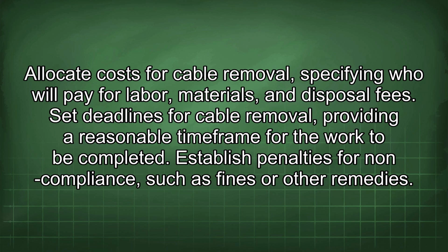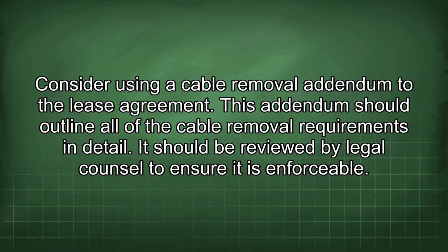Set deadlines for cable removal, providing a reasonable time frame for the work to be completed. Establish penalties for non-compliance, such as fines or other remedies. Consider using a cable removal addendum to the lease agreement. This addendum should outline all of the cable removal requirements in detail. It should be reviewed by legal counsel to ensure it is enforceable.